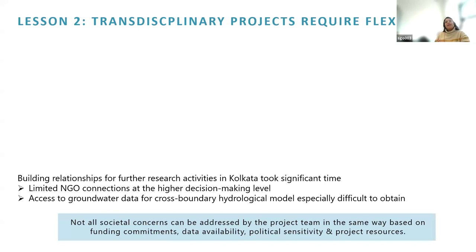And the other important lesson in terms of flexibility was the amount of time required to build relationships for conducting the project in Kolkata. It took a lot more time, and it was really important that we cultivated those relationships there because of how hierarchical it was compared to Bangladesh. Our NGO partner there also had limited connections, especially at the higher decision-making level. So when I did my field visits initially, I would spend a lot of time meeting people, telling them about the project, getting them on board and willing to engage with us, which takes away from research time as well. But it was really important, because otherwise I think it would have been even more difficult to do research in that context.